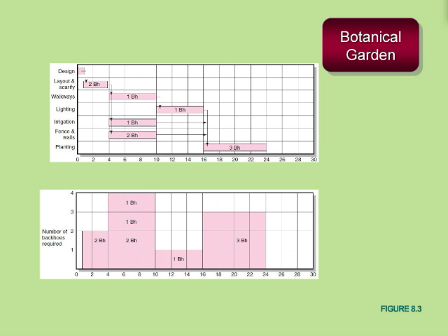Try this when you work on these types of projects, these time-constrained projects. There's no heuristics or rules you can follow. You just got to play around with it and see if you can meet the goals of reducing the number of resources required for the project, reducing peak demand, and reducing fluctuations. So you can see here that the demand starts at 2 backhoes, goes up to 4, then down to 1, and back up to 3.